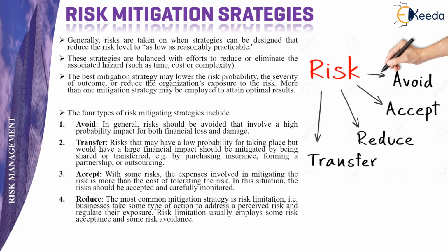Accepting the risk. With some risks, the expenses involved in mitigating the risk are more than the cost of tolerating the risk itself. In this situation, it is best that such kind of risk should be accepted and it must be carefully monitored.